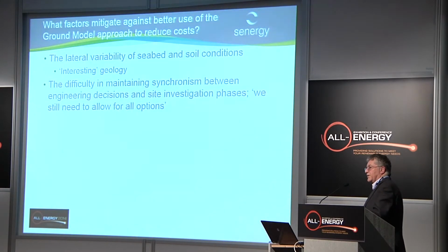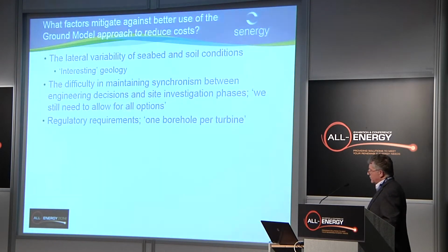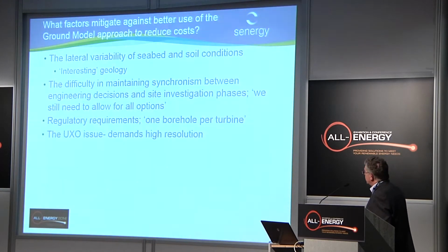And then this is, again, a major factor: the synchronism between the engineering decisions. When are these guys going to choose what turbine they're going to install or what foundation they're going to use? Because we've got to go out and do some more survey work. We've got an opportunity to go and do more survey work. We need to synchronize those phases of work. And this issue we talked about, one borehole per turbine, do we really need it?